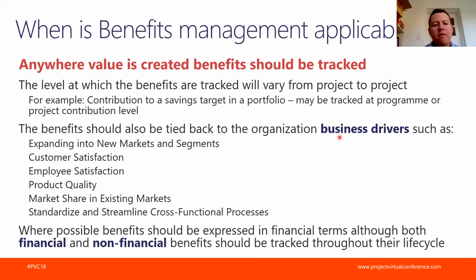So now, when are we doing benefits management, and when is it applicable? To be honest, it can be applicable in any industry and in any project or any organization. So actually, it's anywhere value is created. A benefit is tracked as soon as value is created. The level at which the benefit is tracked can vary from project to project or from program to program. An example here: a contribution to a saving target in a portfolio may be tracked at the program level, or at the project contribution level.